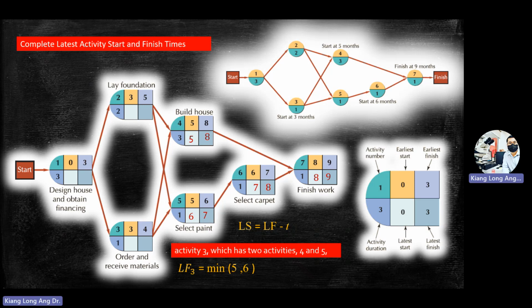Choose the minimum. So forward one, you choose maximum. Backward one, you choose minimum. Yeah, number is 5. From here you can know the pattern already. So above one is 5.